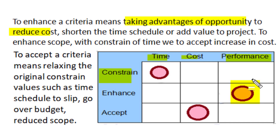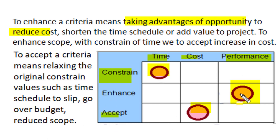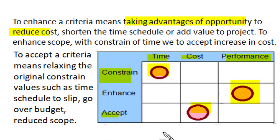When we need to enhance scope or performance within a constrained time, we must improve project specification and add value to performance, which requires increasing cost — so the cost criteria must be accepted. Accepting a criteria means relaxing the original constraint values imposed at the time of planning. When time is accepted, the schedule can slip and take more time than planned. When cost is accepted, the project can go over budget. When performance is accepted, the project will reduce scope.